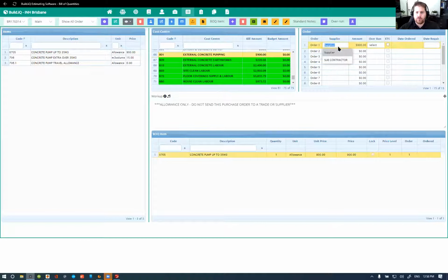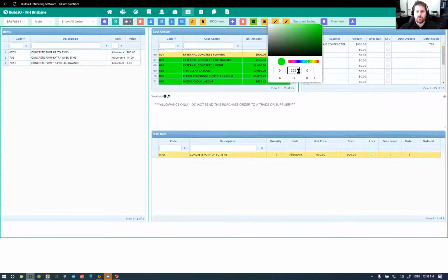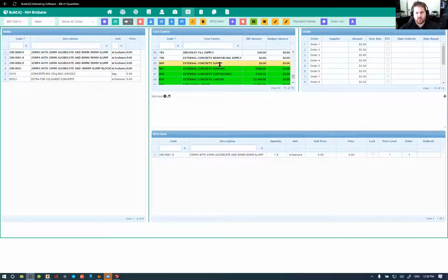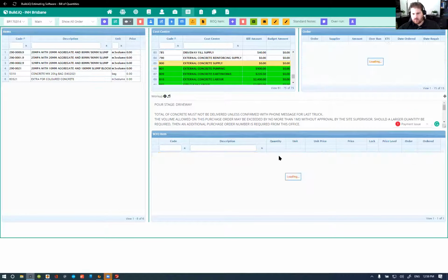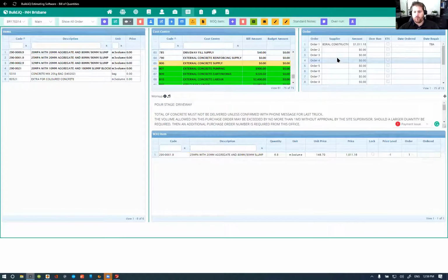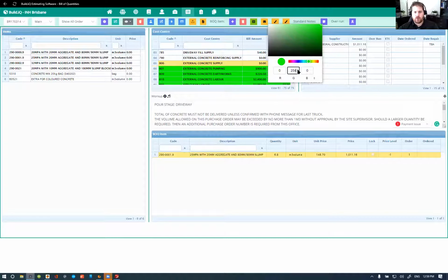Concrete pump, just a one-off. Concrete supply, obviously he's put in 10 square meters, which is where it's come up with this price, which is not correct. So it is 49 times 0.125 times by 1.1, which is actually 6.8 meters cubed, and Borrell will bring in the pricing.